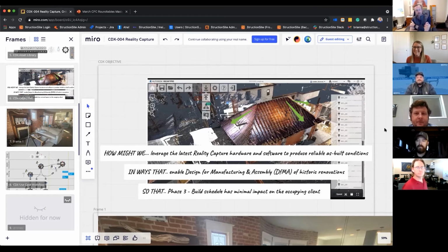Yeah, I think about the jobs. My past company was design build, and we'd spend millions on the VDC side with 4D scheduling and for prefab and for 3D coordination and modeling for design, all for things to sometimes on certain jobs fall apart. And I think the important thing is, it is good if you have the ability, and probably on larger scale jobs, to go and scan again, because you have to have some form of accountability. Because once things start getting installed wrong, the chips start to fall.